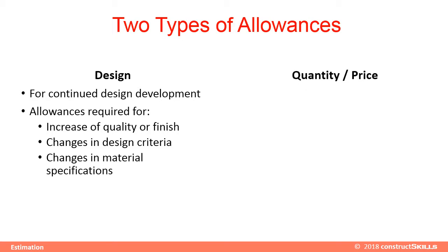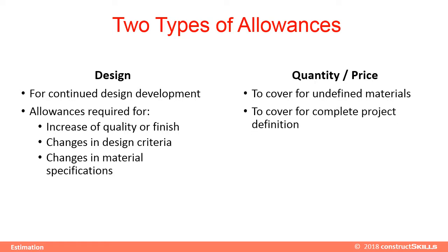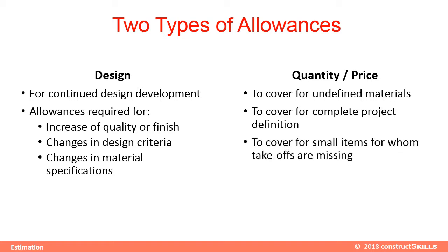Quantity or price allowances. During the development of a cost estimate, there will be a need to cover for undefined materials, incomplete project definition, to cover for small items for which takeoffs are missing, and for human errors in estimating.